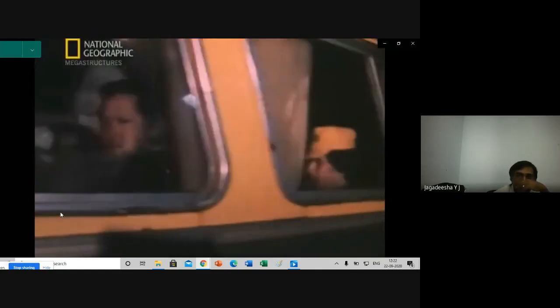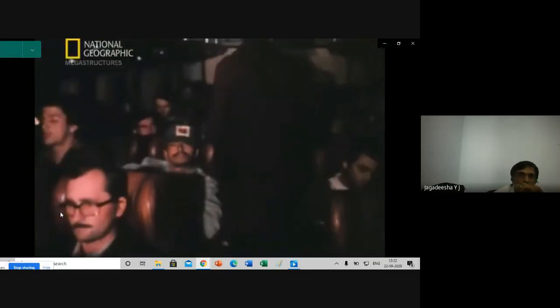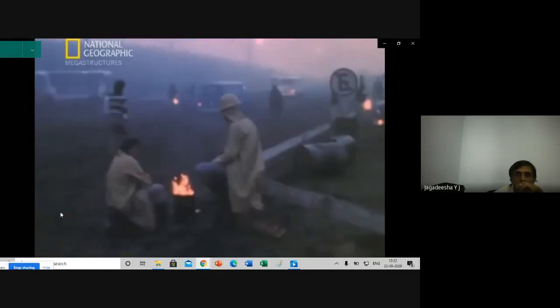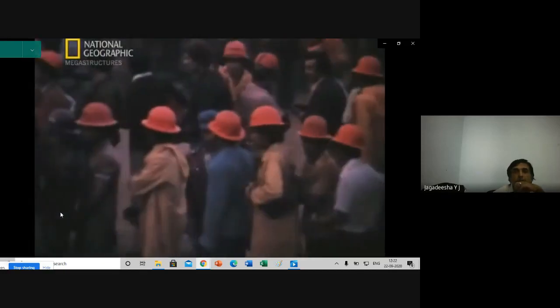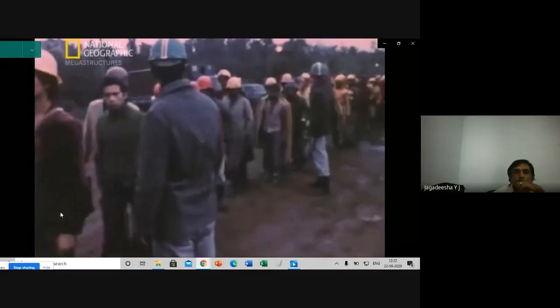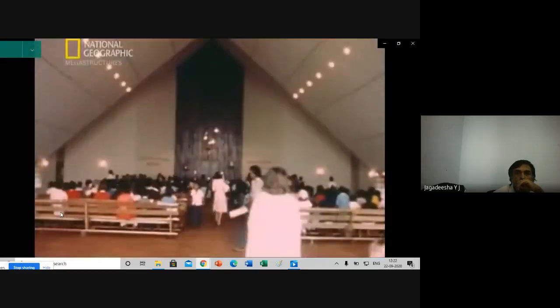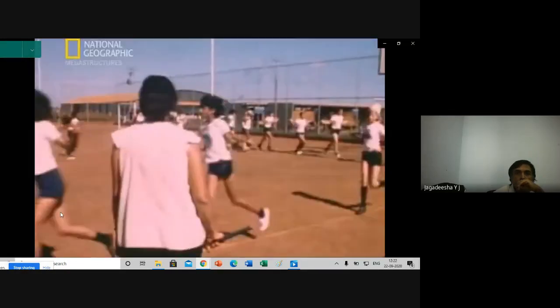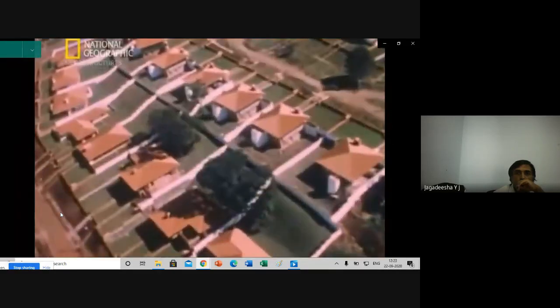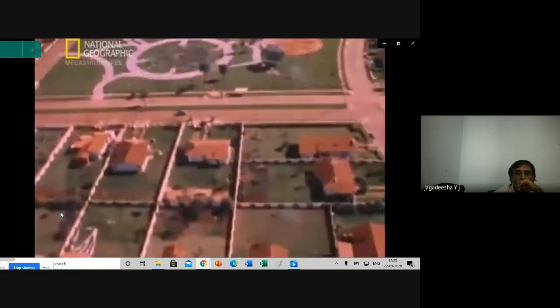Project managers had to choreograph a massive migration of workers into the area. They bussed in tens of thousands of workers from all over Brazil. Everything a large town needs, from schools and hospitals to churches and kindergartens, had to be built. New housing estates were built just for dam workers.